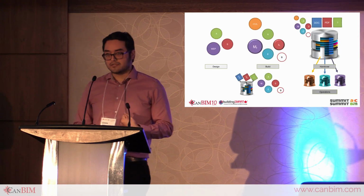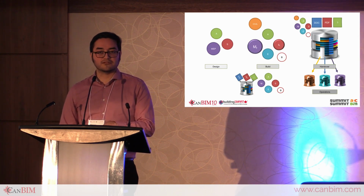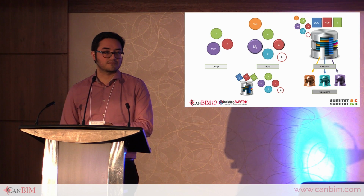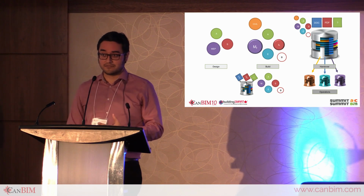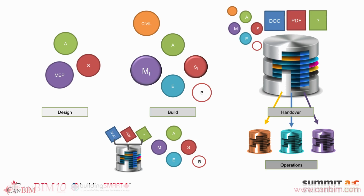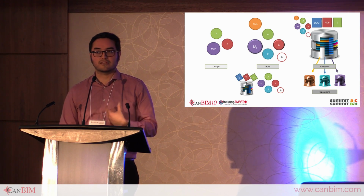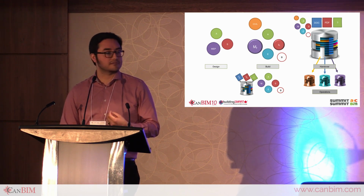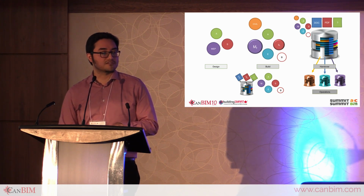During design too, part of what we do, which has been hinted at earlier, that is very important, is that we need to share information. Most of the project participants are not in Revit, have no interest to live their life in that authoring software. But they need to have access to the information to review it, to know that it's correct. And the way of doing that, from our perspective, is to grab those models and extract them into a true external database that makes sense of everything together, so that we can then collect information, things like shop drawings, warranty certificates, serial numbers, installation dates, for those tracked assets during construction.